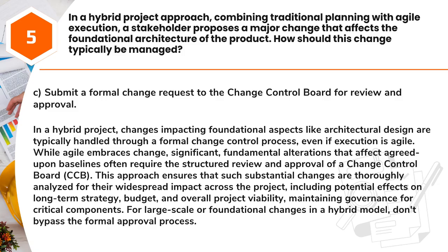Change Control Board, CCB. This approach ensures that such substantial changes are thoroughly analyzed for their widespread impact across the project, including potential effects on long-term strategy, budget, and overall project viability, maintaining governance for critical components. For large-scale or foundational changes in a hybrid model, don't bypass the formal approval process.